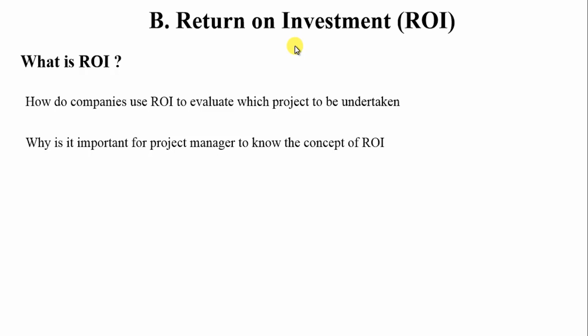Before submitting your figures to the company, you yourself can do a certain analysis and cost-benefit comparison in the same style and figure out what unnecessary cost you can eliminate. Figure out what small reduction in the cost can generate an increase in the revenue, or do a cost saving. As you saw, when we just reduced the cost by 20,000 for project A, suddenly it became the most preferential project, from being number 3 to being number 1.